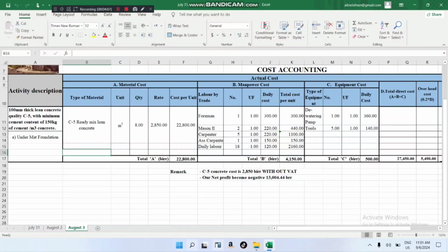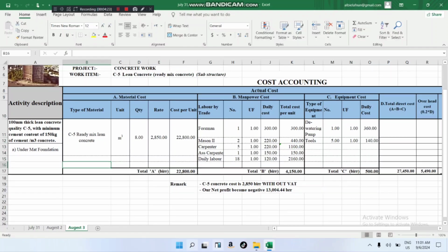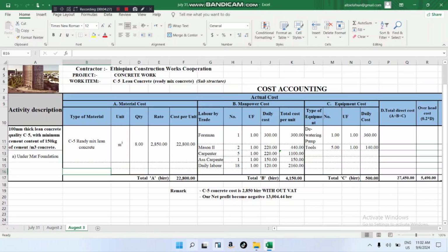And also you can add in the contract that after 30 days or 90 days you can ask for an amendment or another contract, and you can change the price also depending on the market. But until this duration, if the material cost increases, you will cover it by the overhead cost, or ask for a new additional work. Manpower is the same, the factor is as it's used, or you deal with the labors.